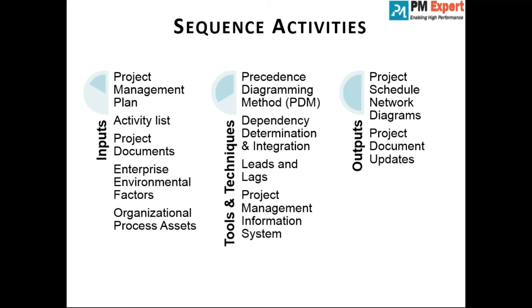So when you hear the term project management information system, you're only looking at the software or the tools you use to display the data or the schedule, like Microsoft Project, Excel. With that being said, when you're using a Gantt chart, is that considered a project management information system as well? See, a Gantt chart is a report generated through a PMIS. A project management information system like MS Project generates Gantt charts as a report. It's a view, a part of it. So MS Project in totality is a project management information system. Jira is a project management information system. Rally is a project management information system. TFS also, right? Yes.